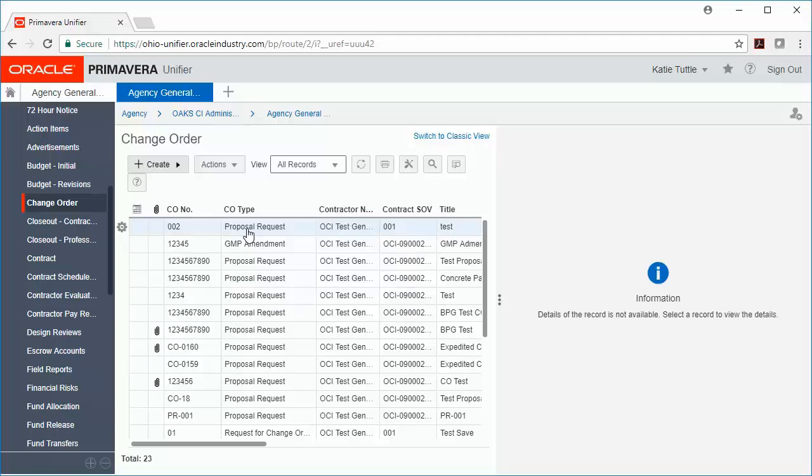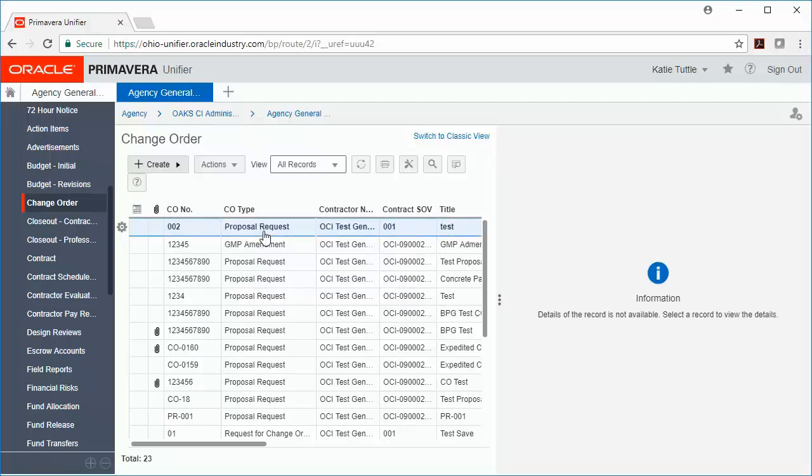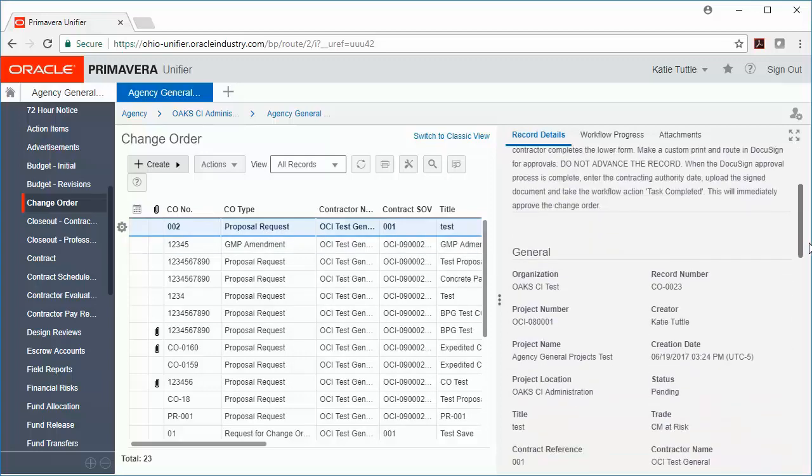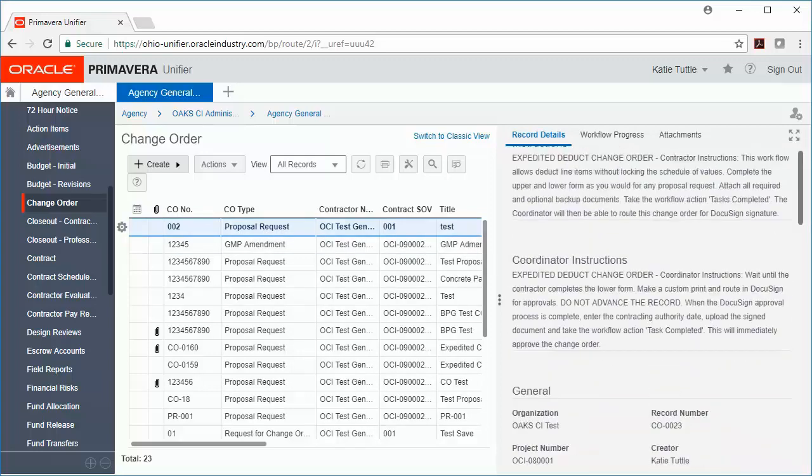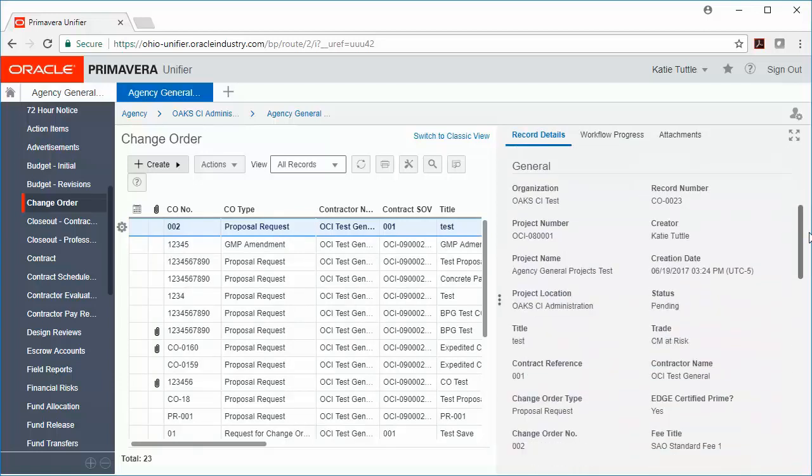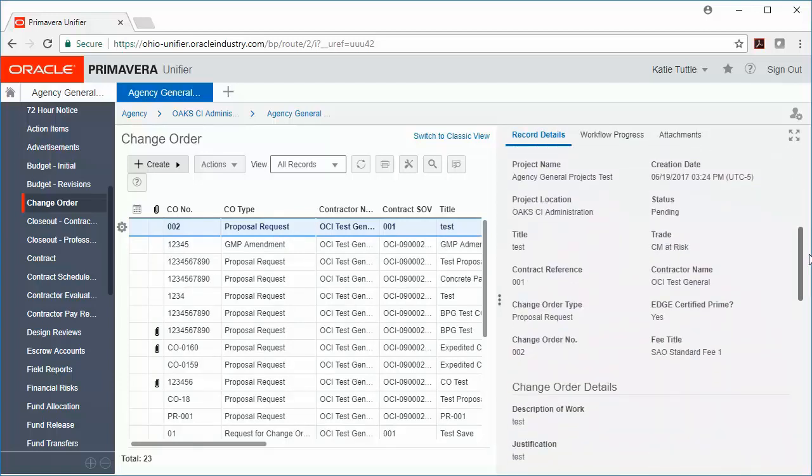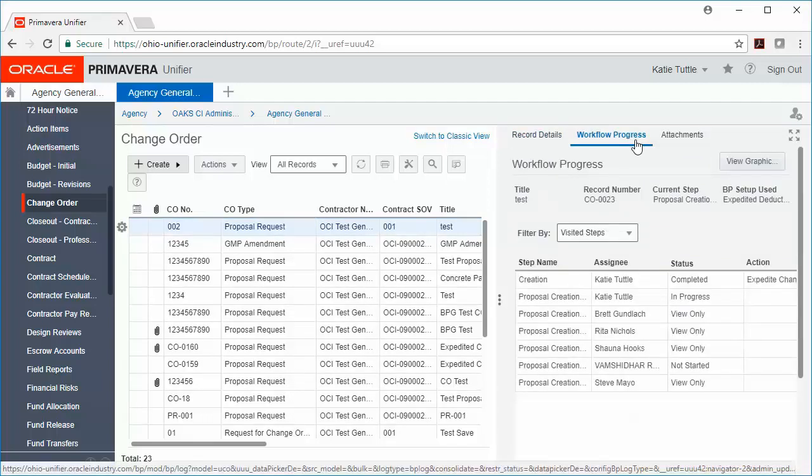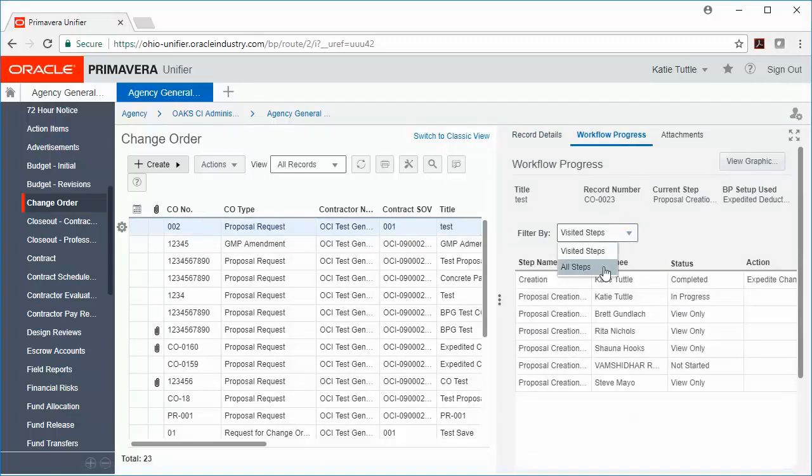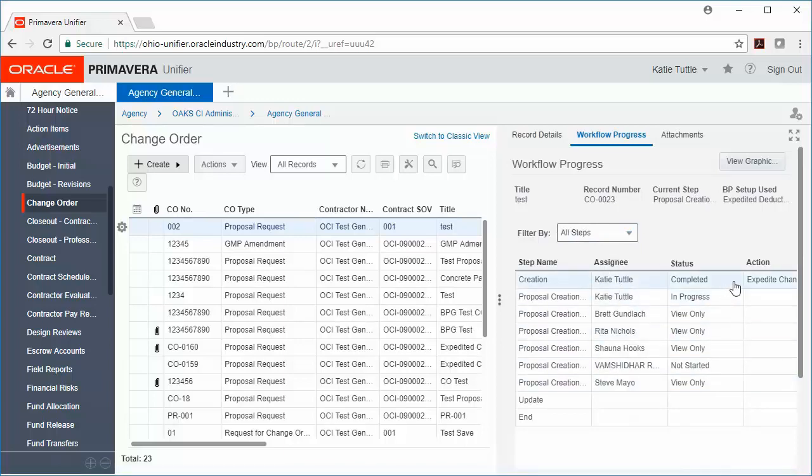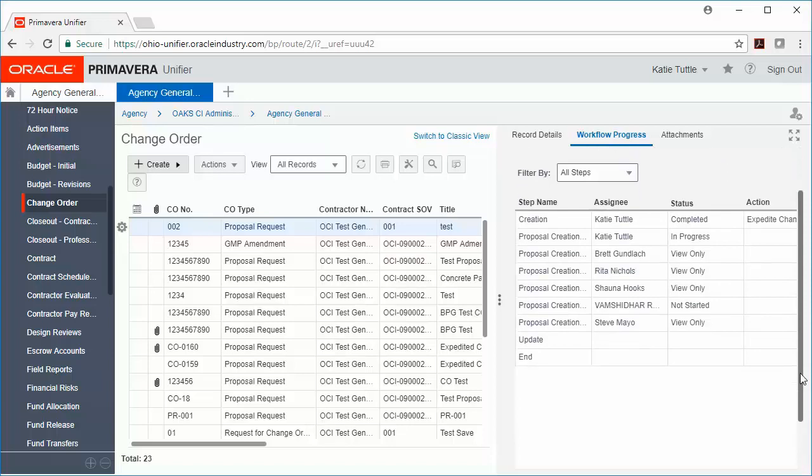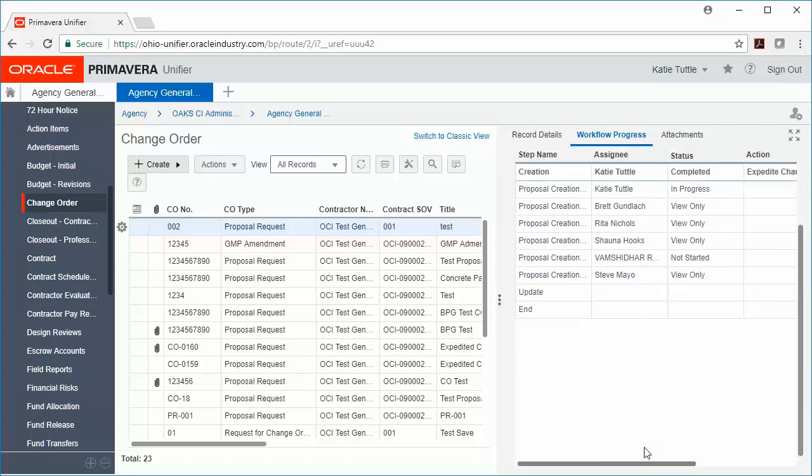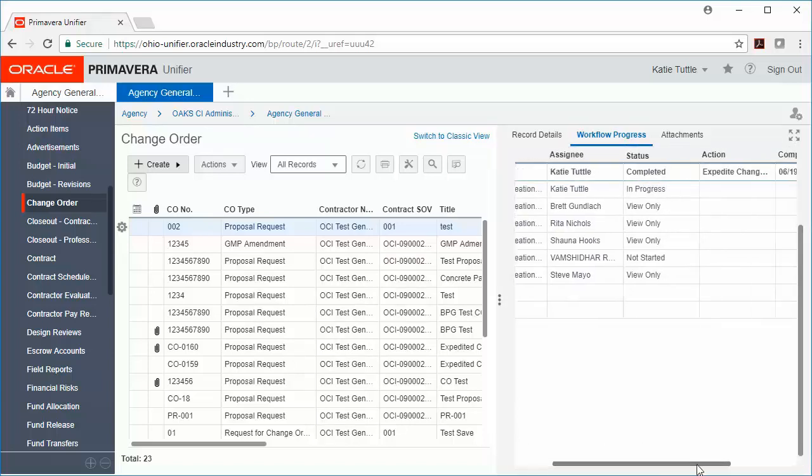To view a specific record in the record type, you can go ahead and just click that record, and then you can see a preview of that over on the right-hand side of your screen. You can also see on the right-hand side of your screen a very basic status of the record. This one says Pending. And then if you click the Workflow Progress link at the top of the page and choose Filter by All Steps, you can actually see who did what with this record, who created it, who has completed it, what steps have been taken in this record, and when that was completed.